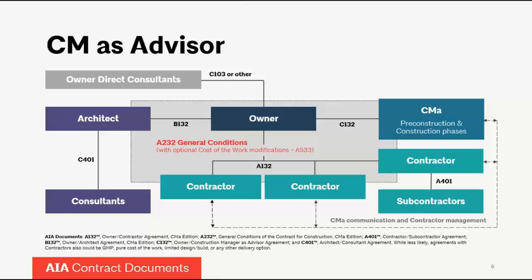The CMA is going to have responsibilities in both the pre-construction phase — the run-up to bidding when the design is being developed — as well as the construction phase. The owner has a solid or direct line of contractual privity with either a general contractor or with multiple prime contractors, and the CM has a dotted line. The CMA does not engage directly any of the contractors; the owner holds the contracts with those parties.